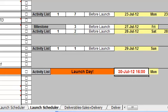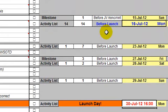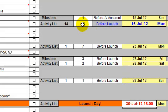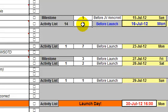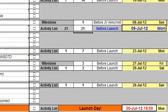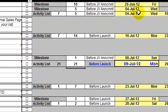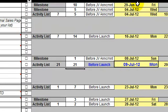The other key date, as I said, is the JV announcement, and this always has to be specified in relation to the launch date. So I can't change that. In this case, I'm saying it's going to start 14 days before the launch. I can change that and say I wanted to start 21 days before the launch, and again all the figures get updated that are related to the launch date. So now the date for my main product to be completed is the 29th of June, having made all those changes.